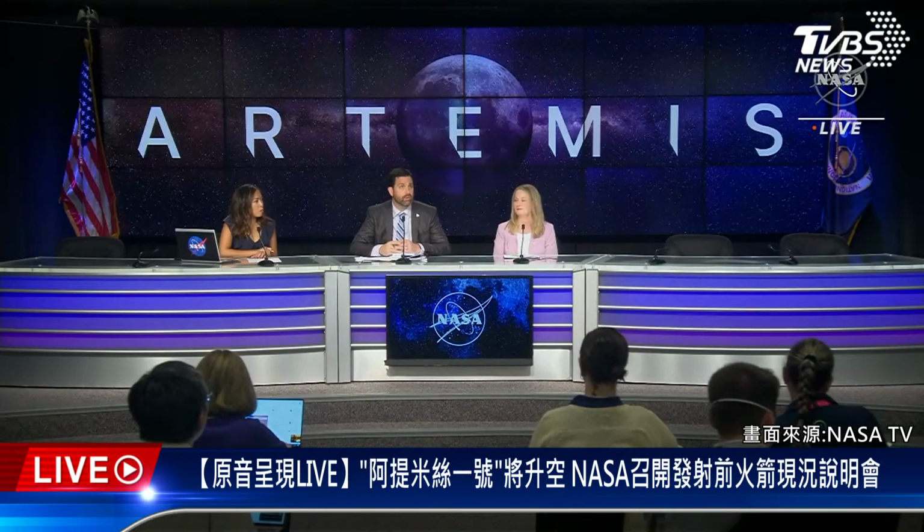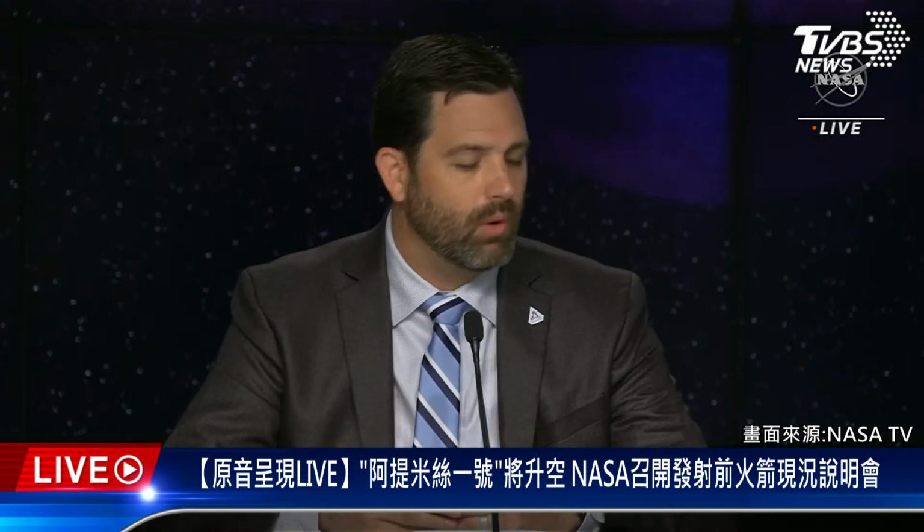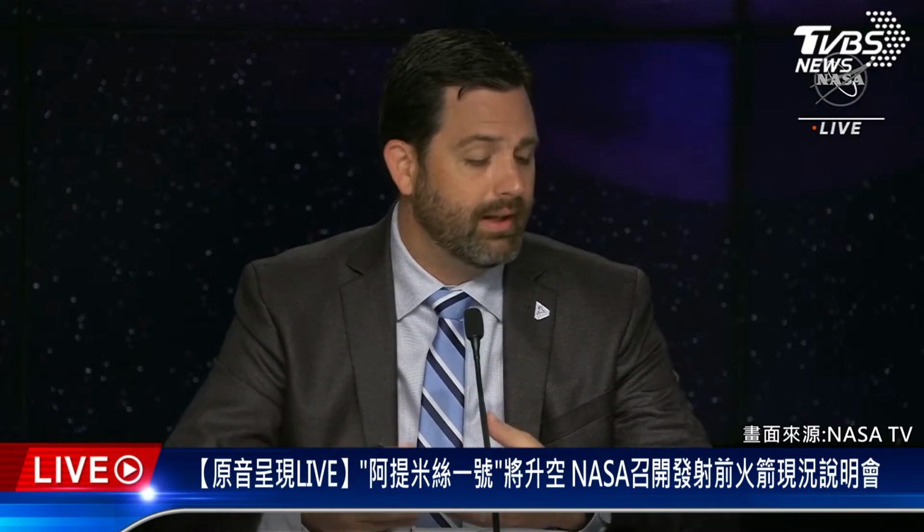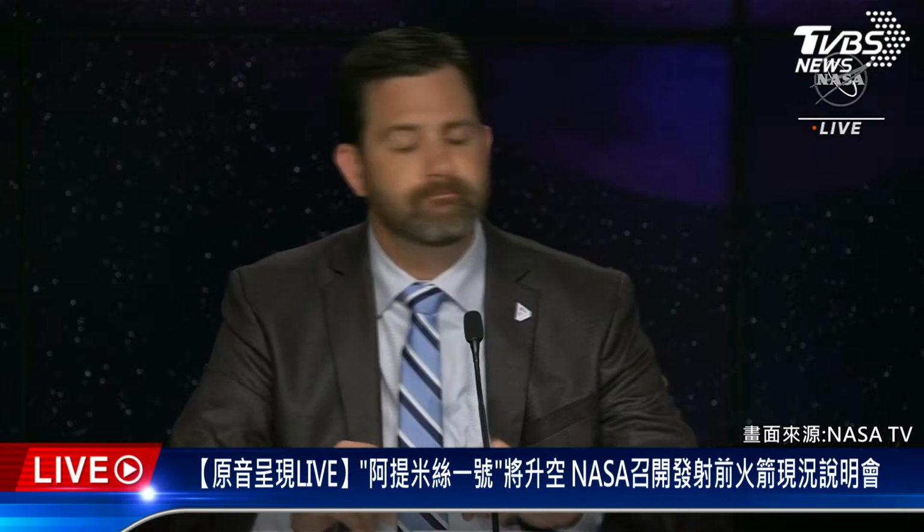Yeah, and to address your second question, it wouldn't necessarily be a minute-for-minute slip, and that's why we want to let the team work through it. They didn't reset the clock until the T-minus 40-minute hold time frame yesterday, so there's not a lot of margin in the timeline. It's very orchestrated, but they may be able to deal with certain 15-minute delays, 20-minute delays, those sorts of things, and we'll try and make up time as they go through. But I would just say there's not a lot of margin in that timeline.